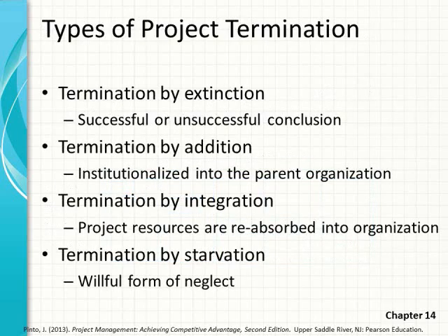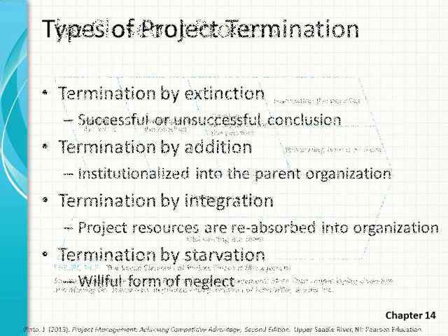Now, projects can end or terminate for many reasons. Pinto points out termination by extinction, either successful or unsuccessful conclusion. Termination by addition, maybe your project is absorbed by the parent organization. Termination by integration, where project resources are reabsorbed back into the organization. And finally, termination by starvation, or just a willful form of neglect and the project dies on the vine.